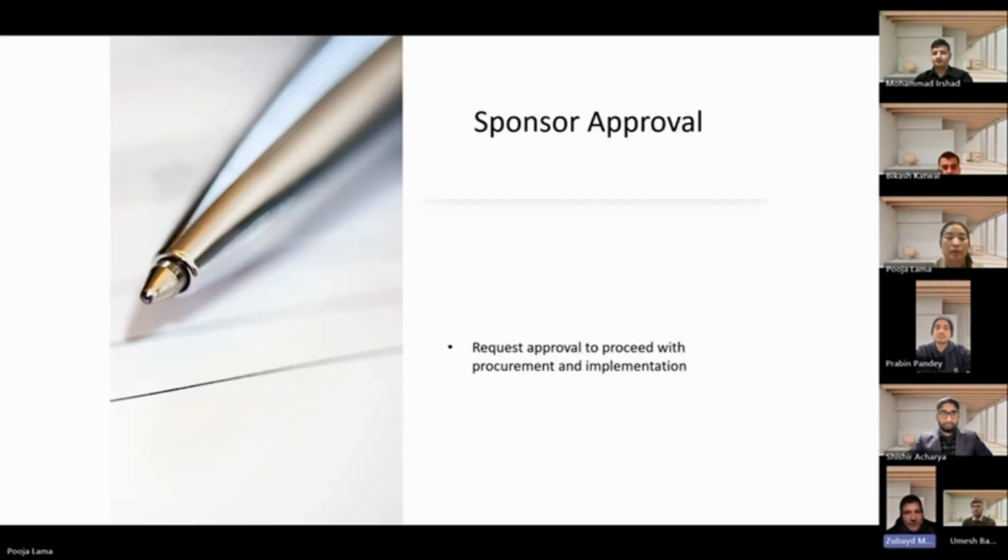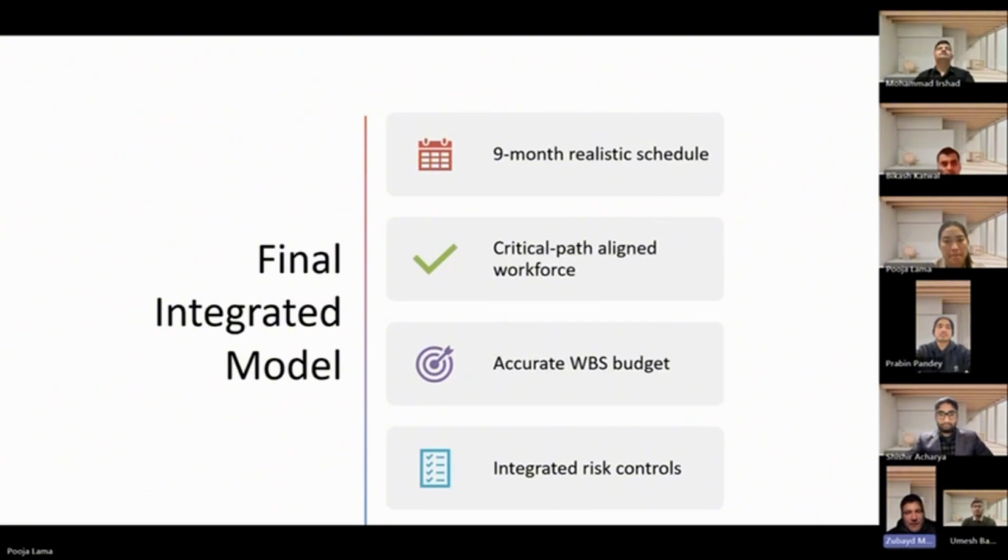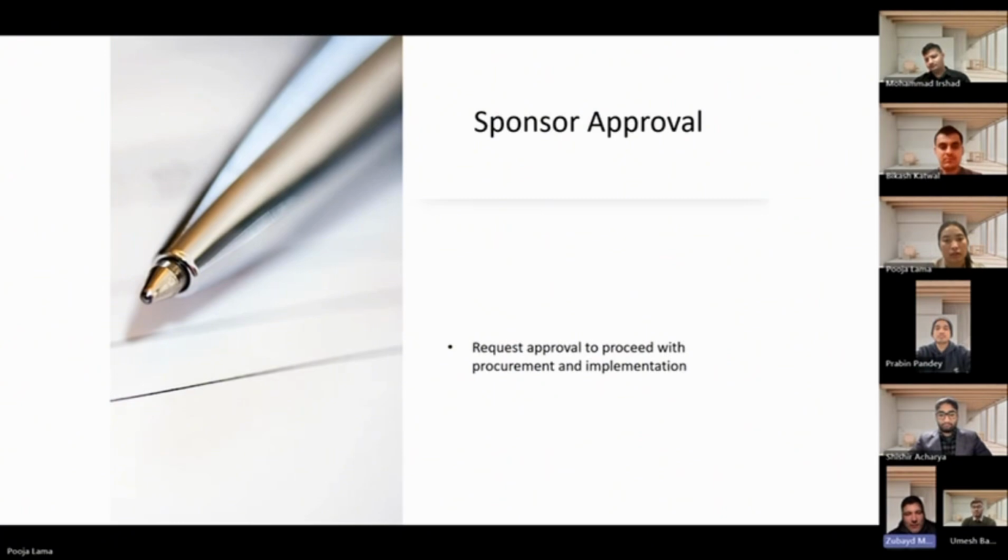To make sure we stay sharp throughout the project, we have created a strong set of KPIs. These are our performance checkpoints. We track schedule accuracy, budget control, labor productivity during peak phases, and the success rate of our smart system commissioning. We even track Step Code 4 and energy performance, making sure our homes meet the city's high sustainability standards. Next slide, please. Put all of these together, the WBS and KPIs, and we get a project that is transparent, measurable, and fully under control.